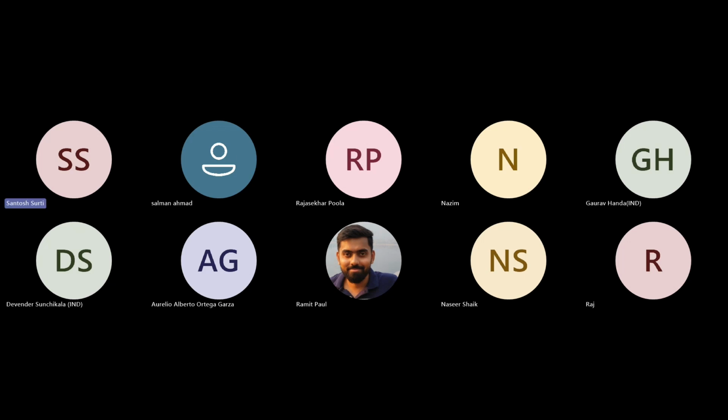I have one question. Yes, Mr. Santosh, go ahead. See, in the WBS, you are defining some hours and the cost. Let's say for the expense, you are defining some cost. You define 100 as the expenses, and when you are creating the transaction, you are entering 120. So you are asking whether the system prompts an error message that you are raising more amount for the transaction. For that, we have the budget control.